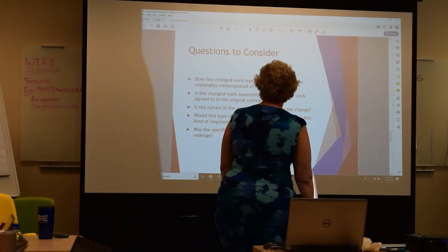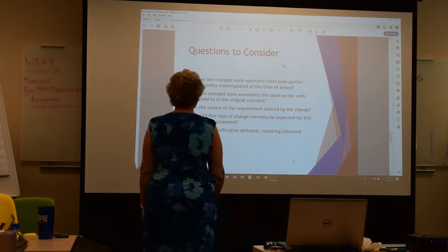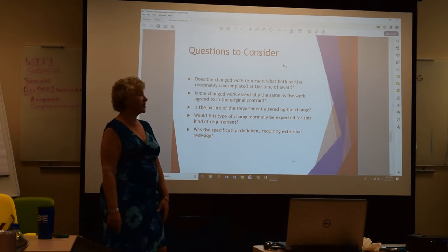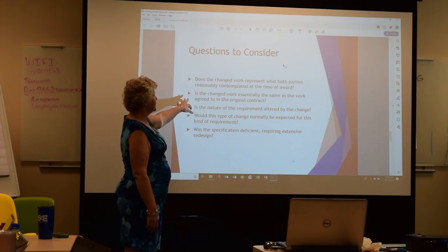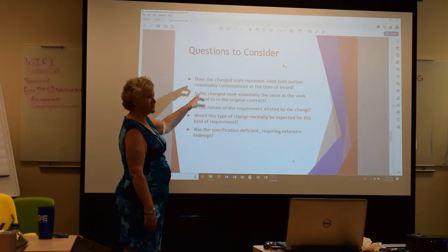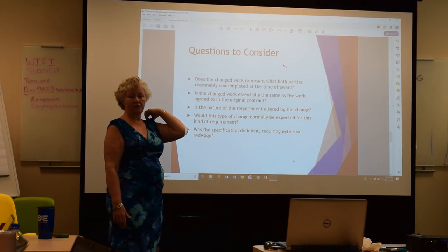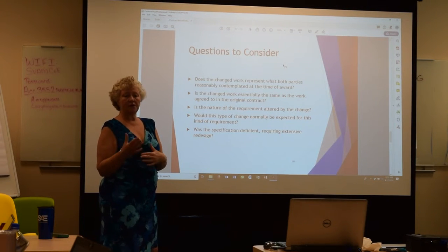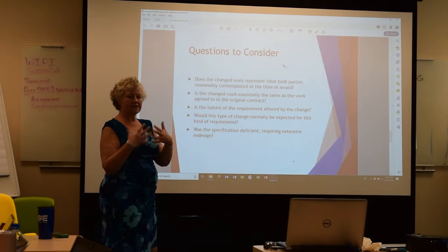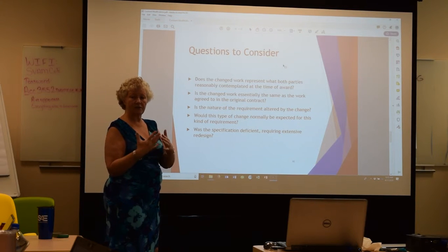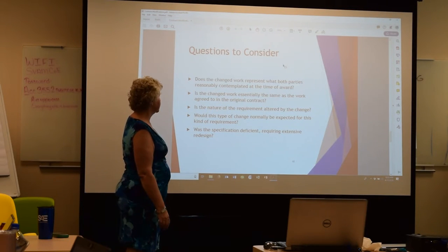These are kind of questions that the government asks itself when they're trying to figure out whether it's a valid change or not. Does the change work represent what both parties reasonably contemplated at the time of award? Sometimes they will videotape or audio tape the negotiations, because they're trying to see if there was a meeting of the minds on what was required in the contract. And they'll go back to those to answer questions like this.